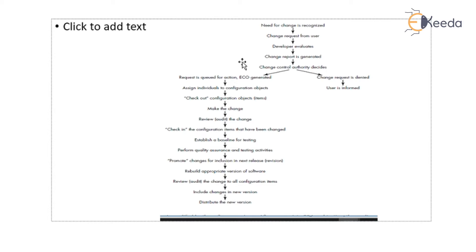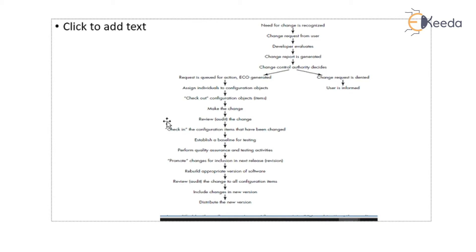But if the authority decides to incorporate the change, the request is queued for action. Individuals are assigned to configure objects, check out configuration objects, make the change, review the change, and check in the configuration items that have been changed. A baseline is established for testing, quality assurance and testing activities are performed, the change is promoted for inclusion in the next release, the appropriate version of the software is rebuilt, the change is reviewed across all configuration items, and the change is included in the new version and distributed to all stakeholders.